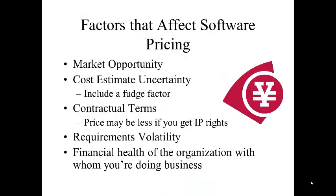Factors that affect software pricing: one is market opportunity; cost factor uncertainty — include a fudge factor so you can move it a little higher than what you think it will cost so you actually cover the cost. Contractual terms — for example, the price may be less if you get the intellectual property rights. Requirements volatility and the financial health of the organization you're doing business with. If the company isn't financially healthy, you'll probably want to request more money up front. Also consider whether this product will allow you to develop a unique position in the marketplace against a competitor — if so, you may want to lower the price a little bit.